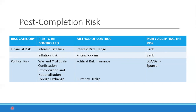The key message of this presentation is that in a project there are a lot of risks to be considered, and those risks must be removed from the SPV so that banks would be willing to lend to the SPV on a non-recourse project finance basis. You can only do that by having a network of contracts that transfer risk out of the SPV to other parties, making the cash flows of the SPV predictable and less risky — and with that, project finance can thrive.